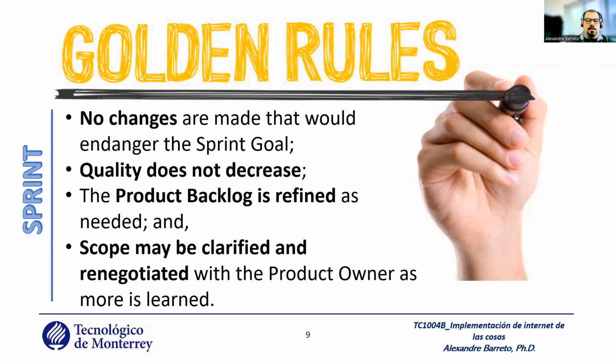But I don't have time. Okay, it's your problem. You need to test. It's better not to finalize the task than to finalize the task without tests. The product backlog is defined as needed. The planning meeting is a good time to refine the backlog, okay, because you have contact with the PO directly, and the PO can clarify to you what the requirement means.